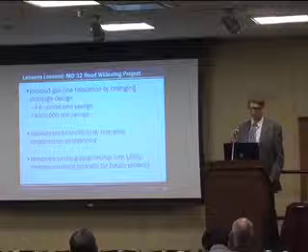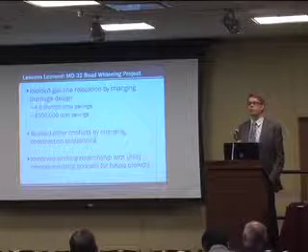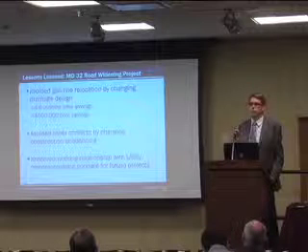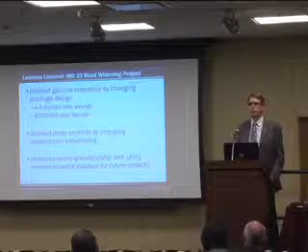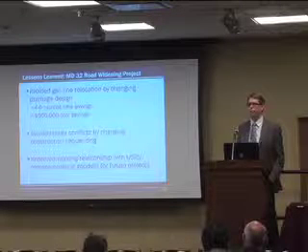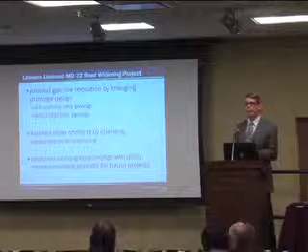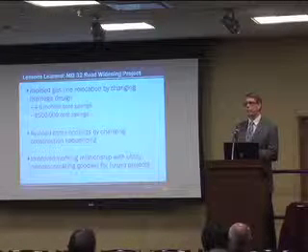There were several other conflicts that were avoided by changing just the sequence of the construction, which did not really bother the contractor at all. It was just a matter of changing things around a little bit. But it made a huge impact on the utility conflicts that were avoided.